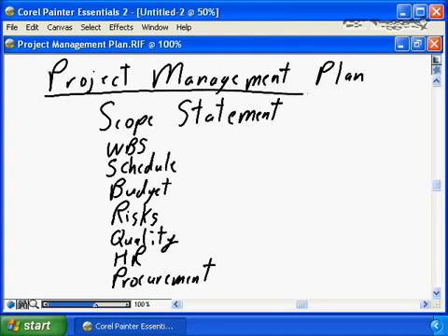The end result of the planning process is the development of the project management plan. No surprise, the project management plan is going to contain each of the components that we just talked about. A very well-defined, very specific, clear, unambiguous scope statement. It needs to define the elements of the WBS and the schedule. I often find it's most effective to simply combine that and provide screen prints from my scheduling tool. Because a good screen print of a well-summarized, proper level of decomposition in the Gantt chart from a Microsoft Project does an excellent job of delivering both the project WBS and the project schedule.